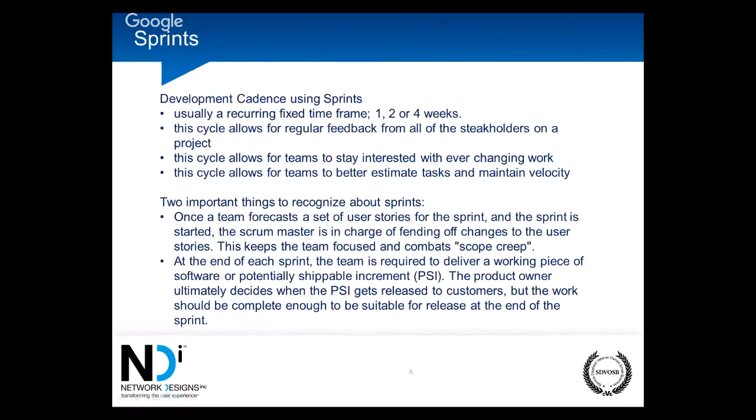Now, that doesn't mean they can't go to the client, meet with them, and then come up with a new requirement that gets added into a new set of user stories that then gets broken into issues that then gets thrown onto the top of the backlog. All of that work can happen, and then at the next sprint, the top of the backlog is collected, and those items are pulled to be used for the next sprint.